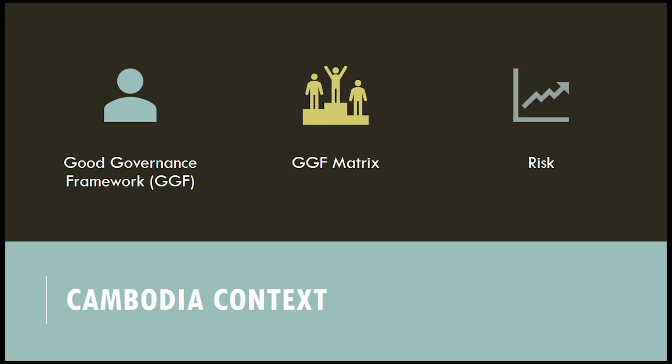In the event procurement is for single sourcing, direct contracting, or force accounts, in addition to any development partner approvals required, Ministry of Economy and Finance prior approval is required before the methods of procurement can be used. Ministry of Economy and Finance and any other Royal Government of Cambodia approvals should be obtained before seeking the development partners' no objections.